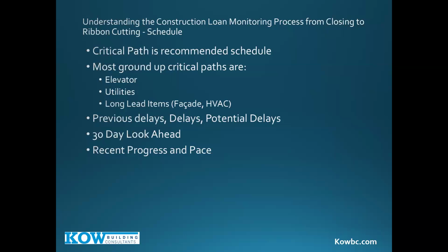And if you need to prove it to yourself, this is how you prove it. If your bathroom person calls and says, hey, bad news, that specialty bidet and toilet you wanted, that package, it's going to delay me a week. I'm not going to be done in 4 weeks now. I'm going to be done in 5. You're like, that's fine. You're not sweating it because you didn't move back in because your kitchen's not done.